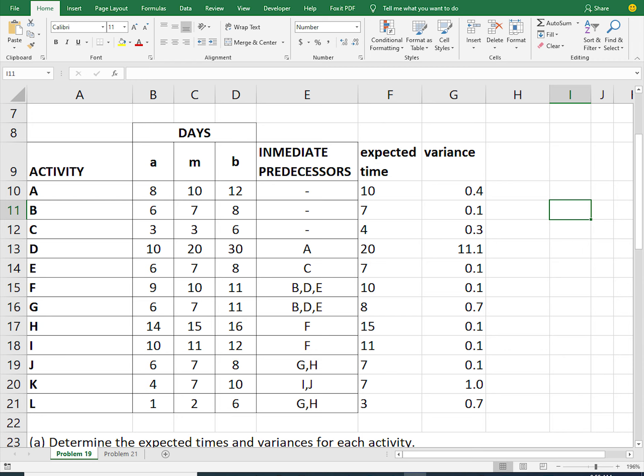Today we are going to create a network diagram for this question. The first thing we are going to do is calculate the expected time. The formula for calculating expected time is: take the pessimistic time, which is 8, then add 4 times the most likely time, then add the optimistic time, and divide the sum by 6.